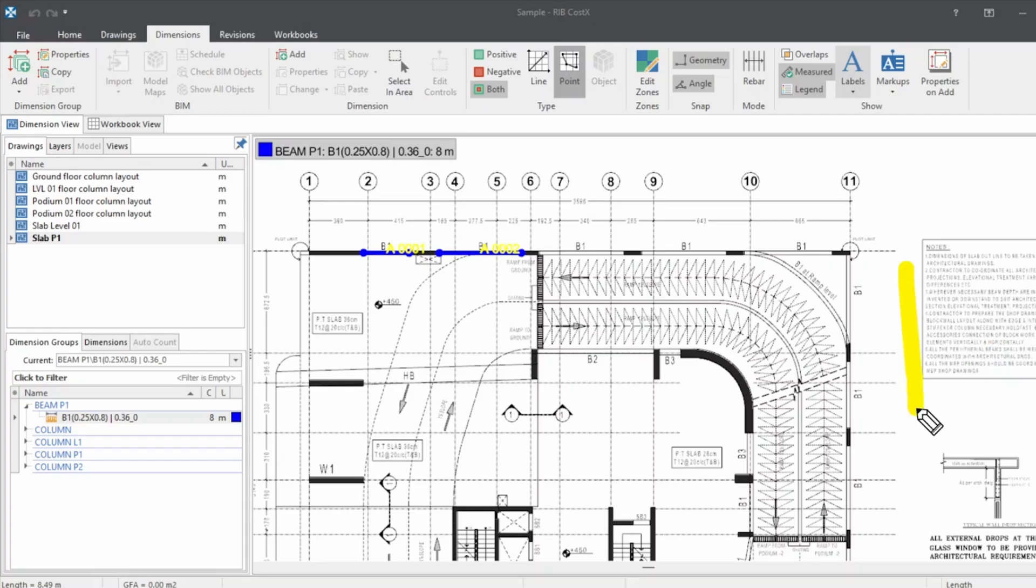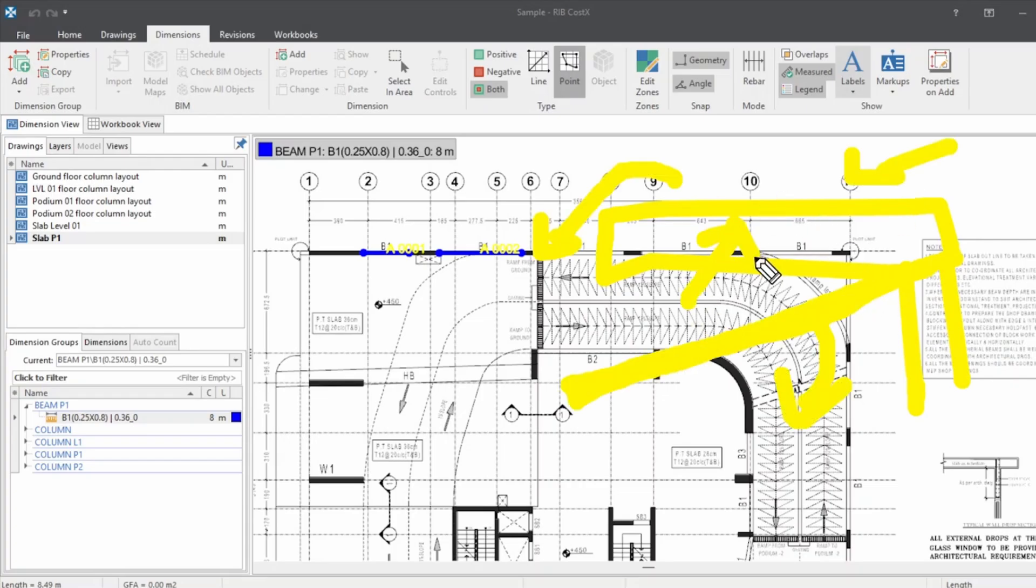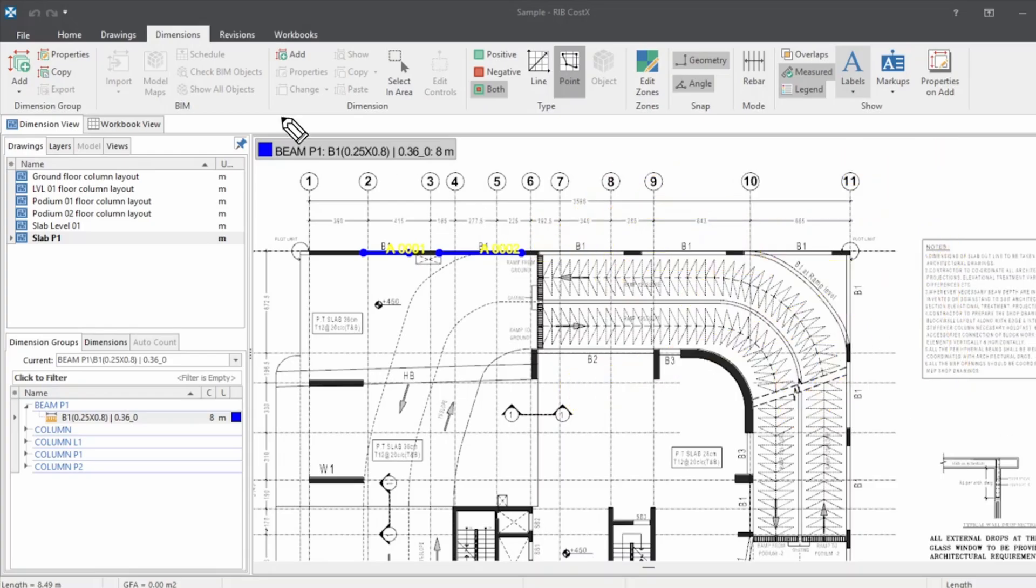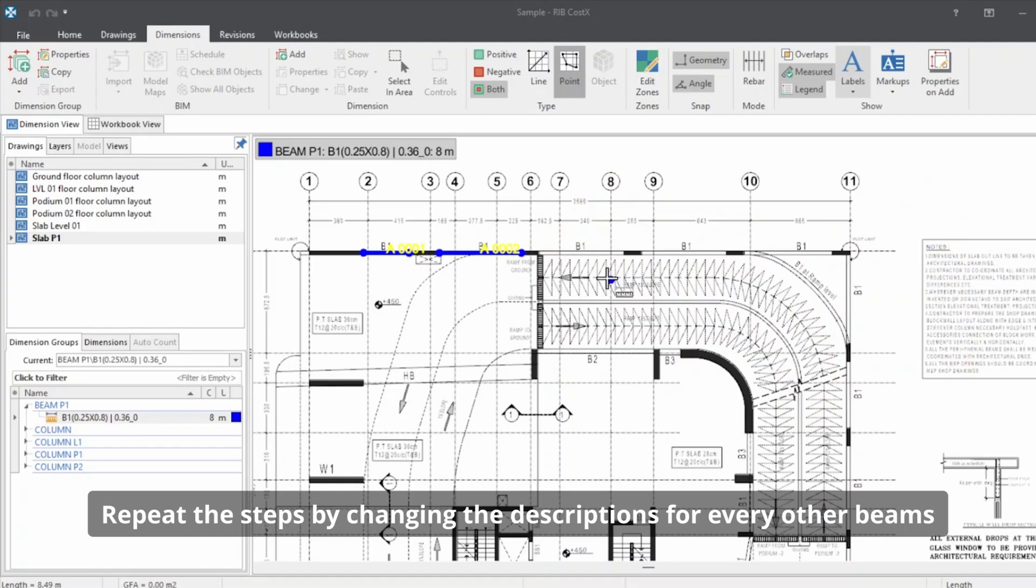Let me show in a section. So this is the beam, OK, so this is the ramp. Outer and inner side doesn't touch with any slab, so for both sides we have to provide full shuttering. So mention 0, 0. I'll repeat the same process.